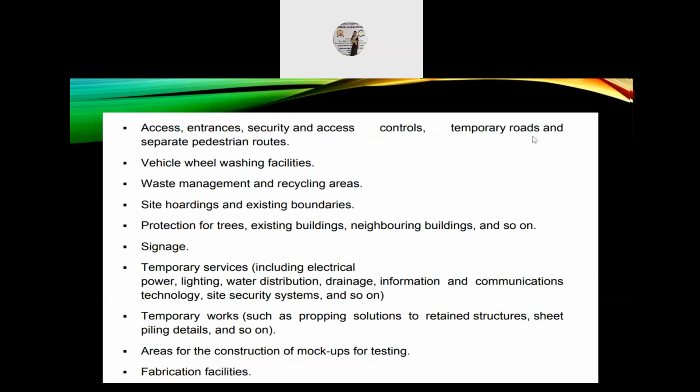In continuation, access to entrances, securities and access controls, temporary roads and separate pedestrian routes. Vehicle wheel washing facilities, waste management and recycling areas, site hoardings and existing boundaries, protection for trees, existing buildings, neighboring buildings and so on, signage, temporary services including electrical power, lighting, water distribution, drainage, information and communications technology, site security systems and so on.